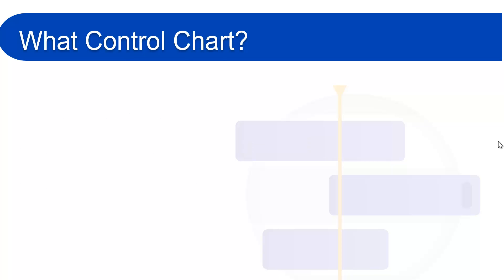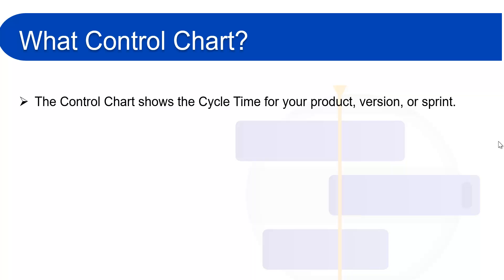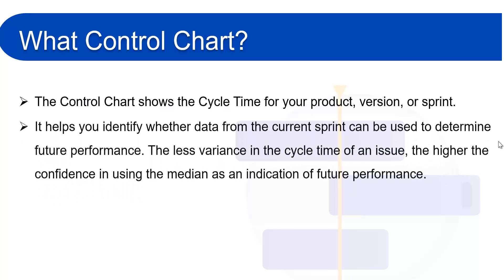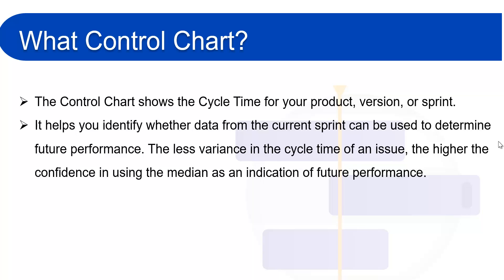The control chart shows the cycle time for your product version or sprint. It takes the time spent by each issue in a particular status and maps it over a specified period of time. It also helps you identify where the data from the current sprint can be used to determine future performance. The less variation in the cycle time of an issue, the higher the confidence in using the median as an indication of future performance.